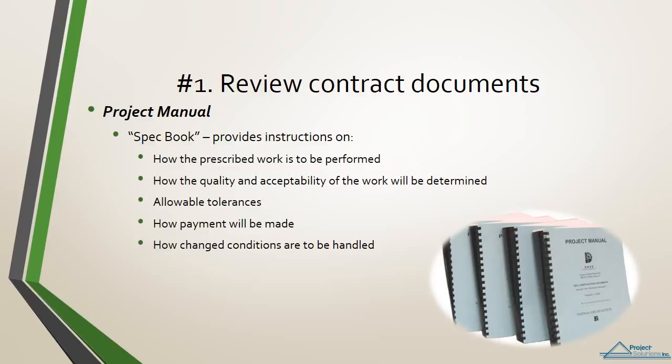Because specification books are often inches thick, many contractors only read the section that affects their trade. It is imperative, however, to review all specification sections before you sign a contract. You are contractually liable for all requirements included in the complete document. The general conditions section, for example, contains contractual requirements for job site safety, submittals, cleanup, change orders, and how to get paid.